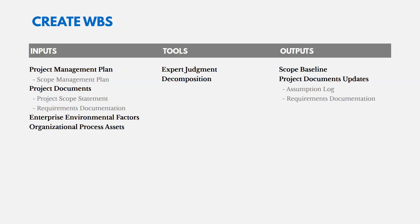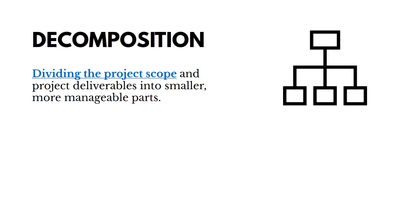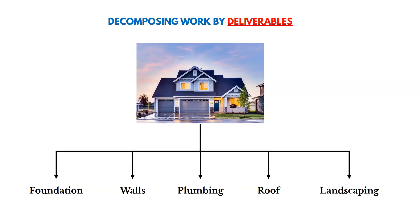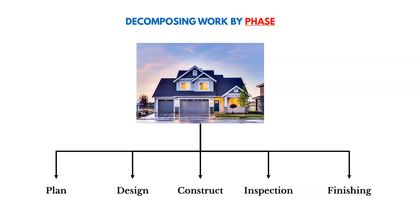The tools are expert judgment and decomposition. Decomposition is dividing the project scope and deliverables into smaller, more manageable components. You can decompose work by deliverables — if we're building a house, deliverables could be the foundation, walls, plumbing, roofing, electrical, landscaping, and so on. Or you could break it down by phase: planning, design, construction, inspection, finishing, and so on. You would know best how to categorize that work.